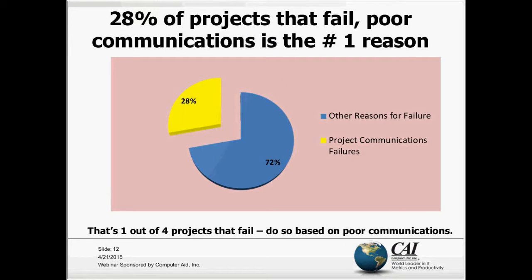I want to show you a survey that PMI did a couple years back in their PMNet. It said 28% of projects fail due to poor communications — 72% were other reasons, but 28% were failing due to poor communications. That's a huge number. That's roughly one out of four projects failing due to poor communications. A 2012 survey from projectmanagement.com on the top ten reasons projects fail also listed poor communications as the number three reason. More and more surveys show communications is always in that number one or two spot.